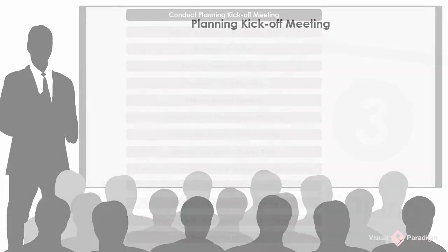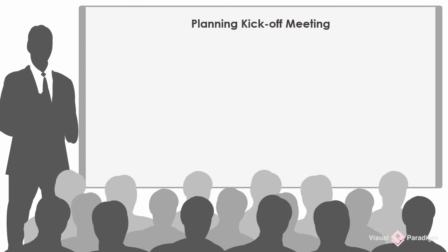Conduct planning kickoff meeting. Before you start any actual planning, a kickoff meeting will be conducted with all the participants of this phase to set expectations, articulate likely risks, and clarify uncertainties the project team may have. Here are the agenda items of a typical planning kickoff meeting.